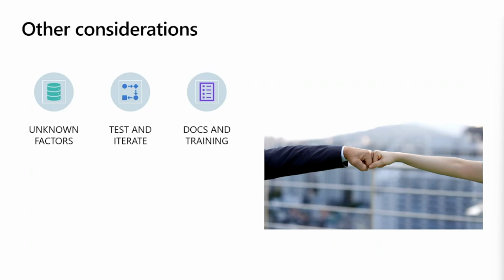And I still recommend anything that's going to be done by the customer should be estimated, because if you only have 4 resources that are dedicated to the project full time and you have 10,000 hours worth of work, even if you have an army of consultants on the partner side helping you, you're never going to reach the finish line, because the constraint there is the 4 resources that are dedicated to the project.